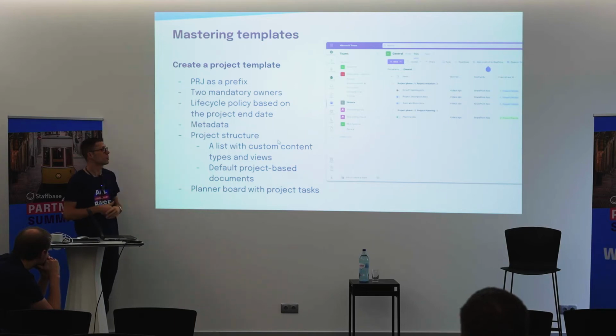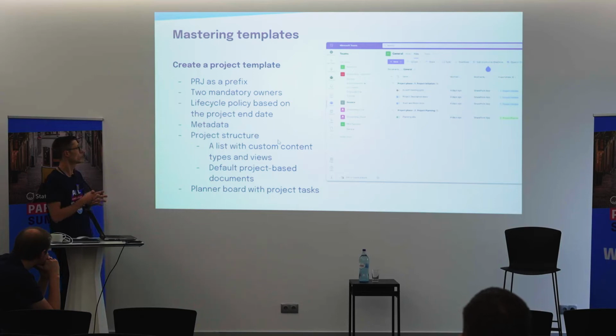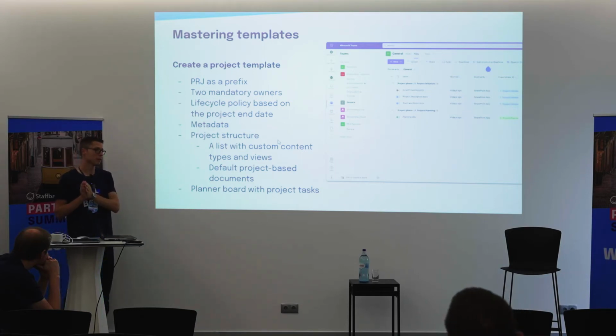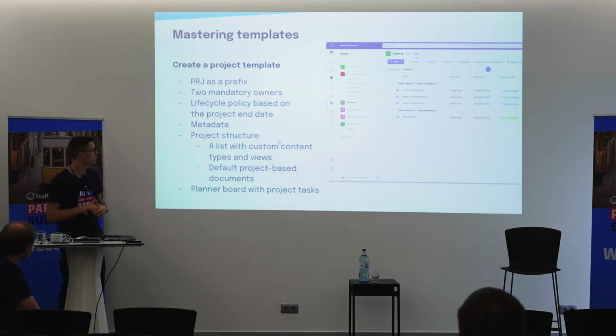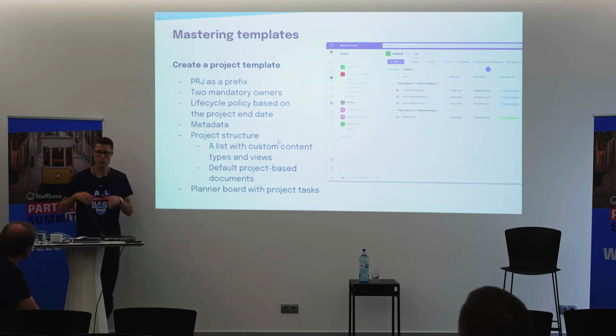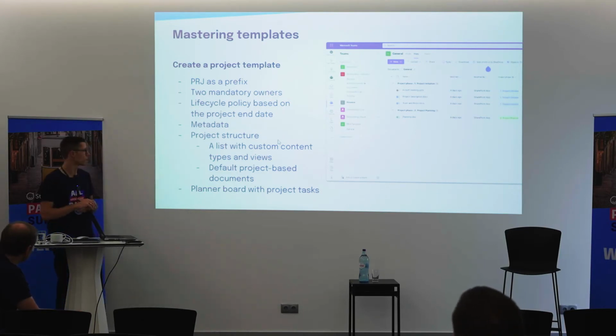They want to have 2 mandatory owners. They want to force the life cycle based on the project end date. So when the project end date has been reached, then this project should be archived to avoid information chaos. The project should have a specific structure with SharePoint list, some artifacts there, some default documents.